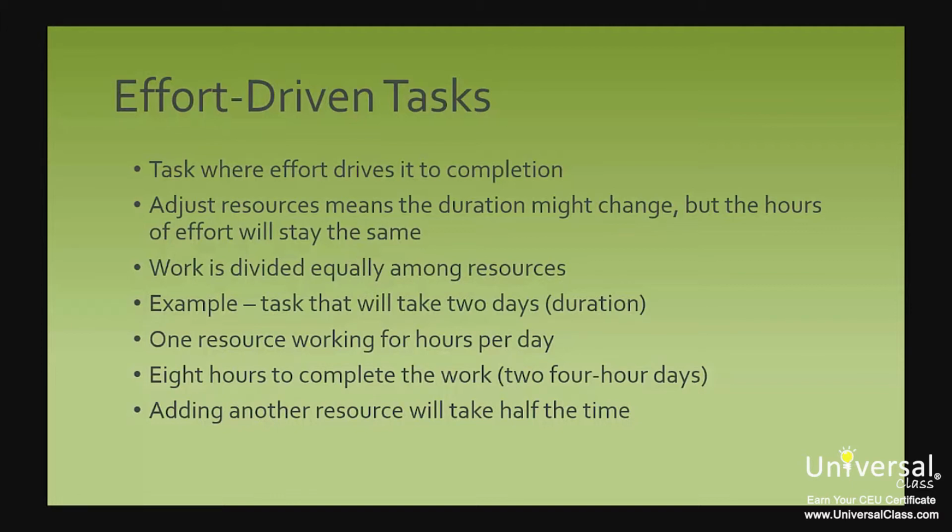The definition we gave you earlier will suffice for the time being to help you understand effort-driven tasks. That said, this is how an effort-driven task works. Let's say that you have a task set up that will take 2 days. 2 days is its duration. You have one resource assigned to this task, working 4 hours a day. It will take 8 hours to complete the work, or 2 4-hour days.